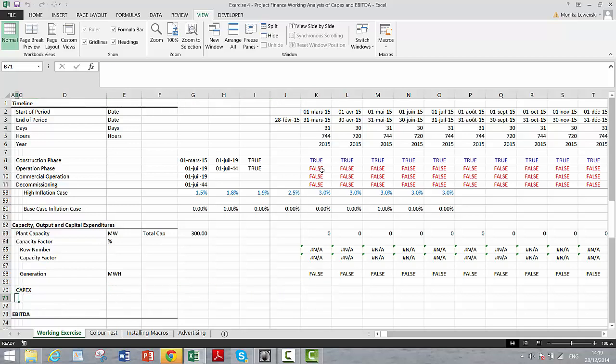Now for the Capex, the first thing I think we should enter is the S-curve. Spend curve, or S. Maybe somebody could tell me if it's called the S-curve because it generally looks like an S, where you have small expenditures, big ones, and then they drop off in the testing stage, or it just means spend curve, S for spend, I don't know. Okay, that name seems to have stuck. And then we can have total Capex.